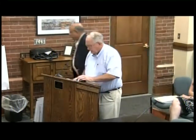Good evening. For the record, I'm Kurt Young from Wetlands Preservation Incorporated. This is a continuation of a hearing for two public hearings associated with the development of a parcel located at 271 Stephen Street. Two houses are proposed: one is an expansion of an existing historic house on the property, and a second new house is proposed. Work is all within the buffer zone. At the last meeting, we had a productive discussion with the commission over alternatives, and were instructed to go back and clean up a couple of issues with the proposed plan. We submitted on August 16th those revised plans detailing the use of pervious pavement and an operations and maintenance program for that, which is provided on the notice of intent site plan. Jennifer and I had a discussion about that earlier today.